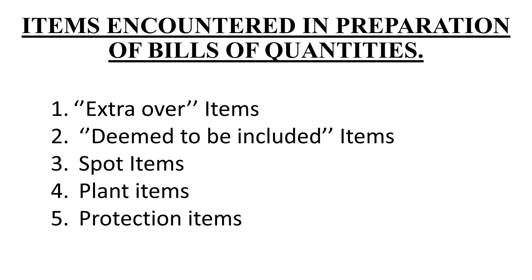So, what are the items that we usually encounter in a bill of quantity? One, we have the extra over item. Two, deemed to be included items, spot items, plant items, and protection items. We shall go through each one of these items.